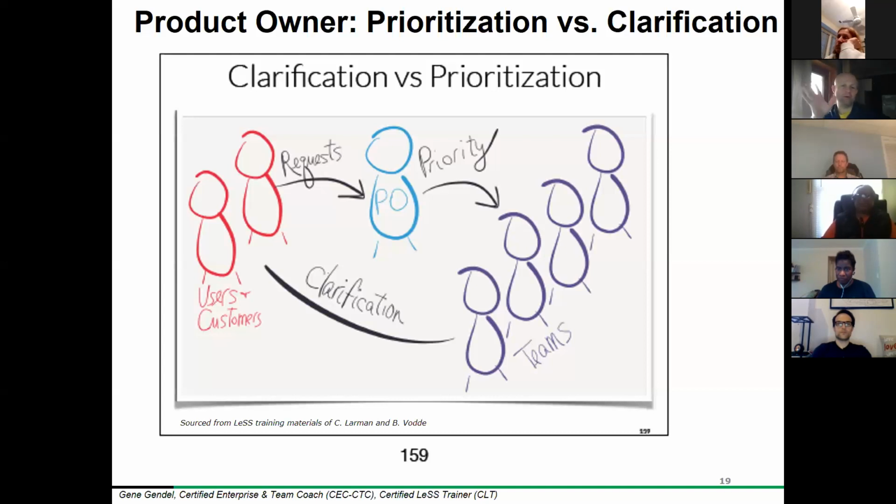Now, I would always argue that this may happen from time to time, but if you're doing this on a bi-weekly or weekly cycle, the cost of misalignment is going to be much smaller than if you went on a 3 or 4 month sequential cycle like we see in waterfall. You will still misalign. It just will be so much more expensive.